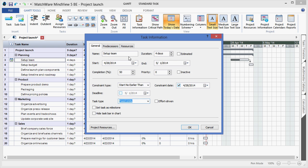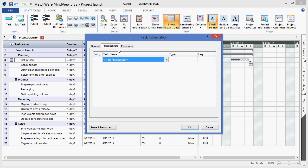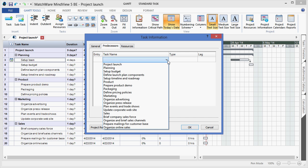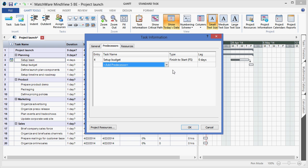Under the Predecessors tab, I can also define a dependency using the drop down menu, selecting the related branch, and choose to apply a different type of dependency.